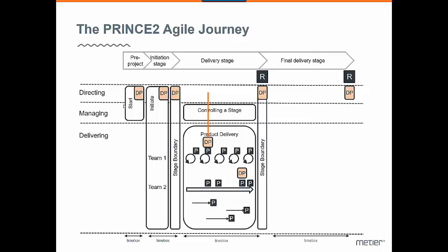And the planning part, there's a good agile technique called big room planning, which is extremely helpful when you want to implement an agile way of working, collaboration and time boxing within a project. Big room planning is getting everybody in the project together in a big room. That's why it has to be big. Well, depending on the size of your project, obviously. So you get them together in a big room for a length of time. 2 days is typically good.